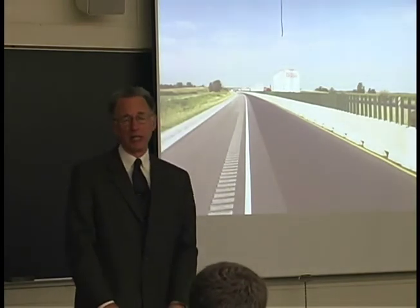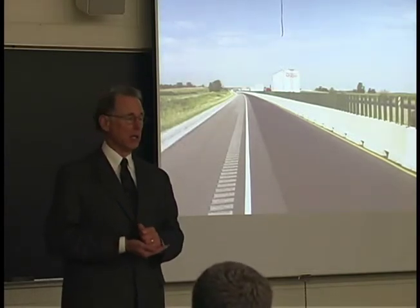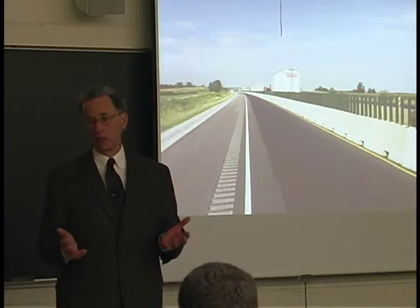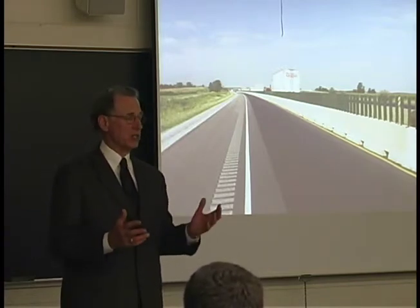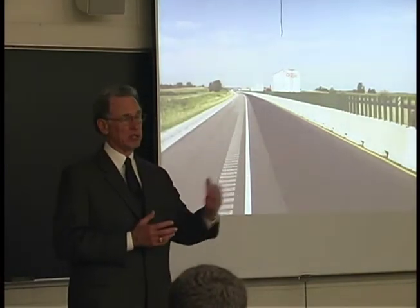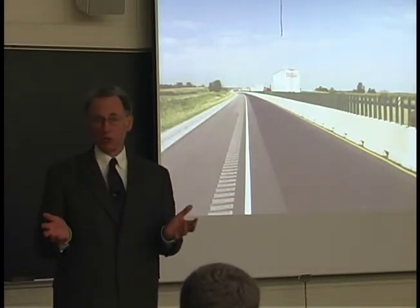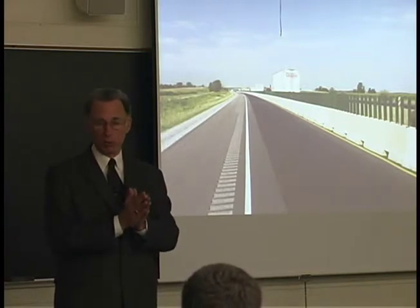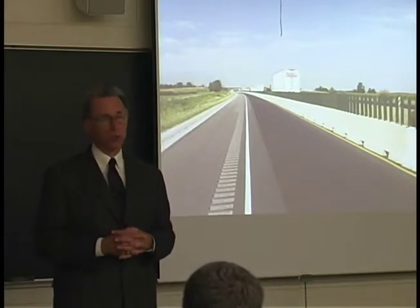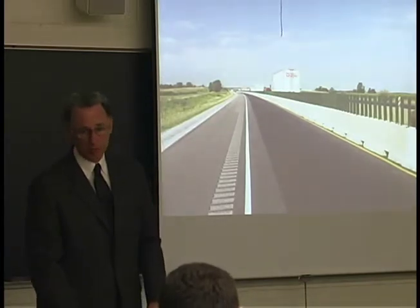What we call the stringers underneath, we use a lot of double 2x6s, double 4x4s, a lot of double 2x8s. If you're buying 2x8s and you're doubling them, and then you're cutting those up into small pieces, we can't use those any longer. So it really makes a difference. Maybe it's cheaper to go out and actually buy 4x4s. We still have lumber mills south of here down by Clay City, and we'll buy rough cut 4x4s. Those are a lot cheaper than putting in double 2x4s or even double 2x6s. So your forming costs depend a lot on your raw material, and you better believe we try to salvage as much of that as we possibly can.